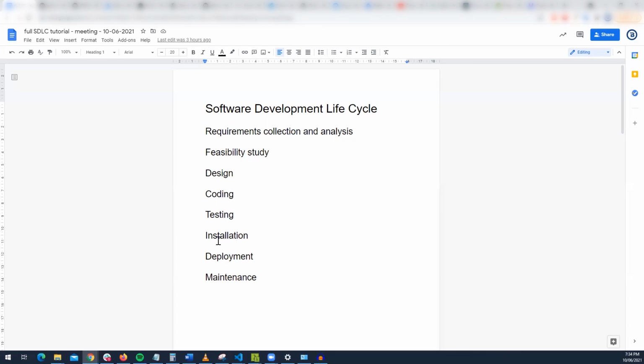But you choose your methodology of development when you're planning, and really what dictates that is when you're collecting requirements, you're trying to figure out, what's the scope of this project, how big is this project, how complex is this project. If it's simple, then we probably don't even need agile, right? But if it's really complicated and there are a lot of requirements, and it keeps updating, and it's a dynamic project, and so on and so forth, then yeah, you're going to need to use agile.